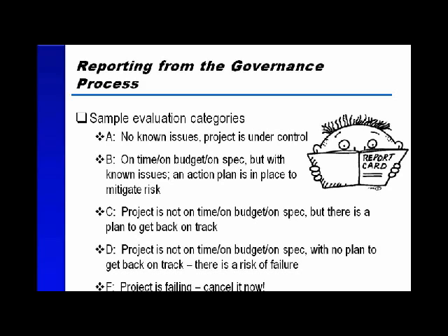I've heard organizations say we bring most of our projects in on time and on budget, but when you look at what's really going on, oftentimes it's because there's no tracking of the initial scope, no tracking of the initial schedule and budget estimates, so we can say we hit the schedule because we hit the one we updated last week, not the one we had 6 months ago.